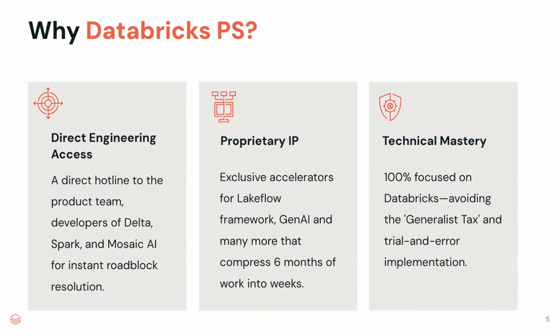And probably the last one, which is sometimes underrated: we need to have an honest conversation about which legacy system we are going to turn off, when, the milestones, and also these business outcomes. Is it realistic, or is it over-promising, based on, as you rightly mentioned, the first approximation mathematical exercise we made? And if we already have signals that for some reason it's not viable, how do we plan around this? If we have 3 out of these 5 points, I think we're already in good shape and we can start. If we have 4 or more, then we have very high chances to succeed.